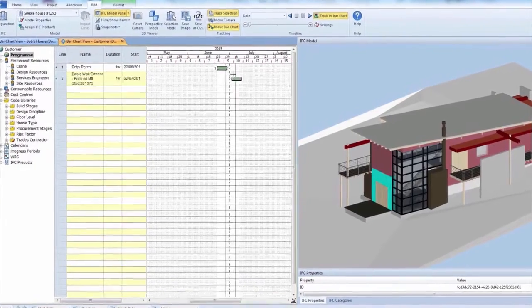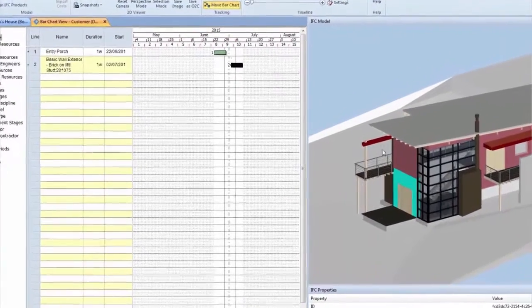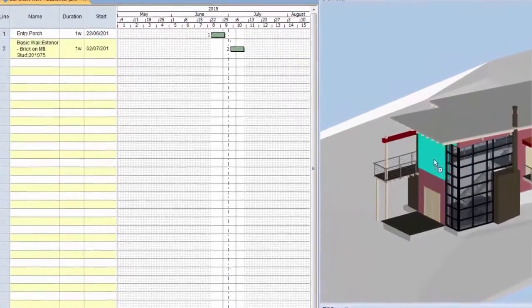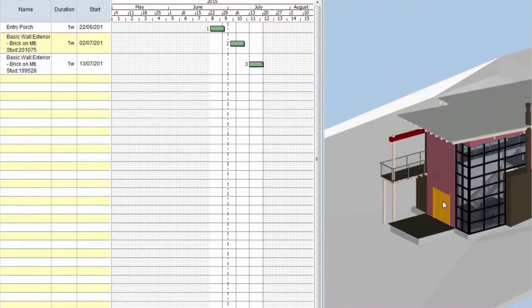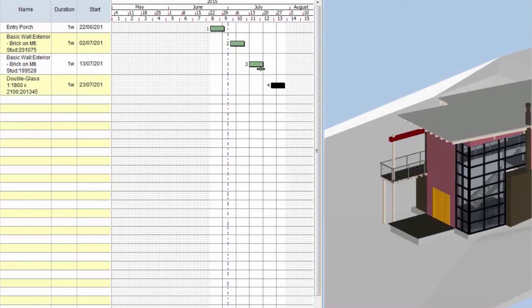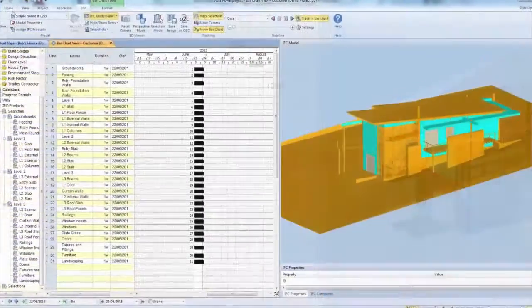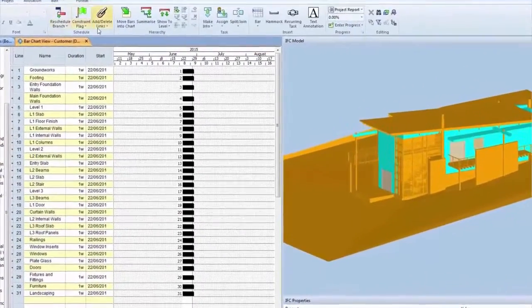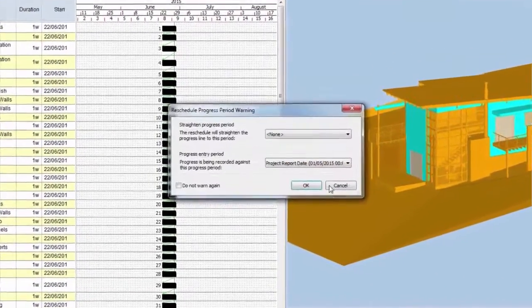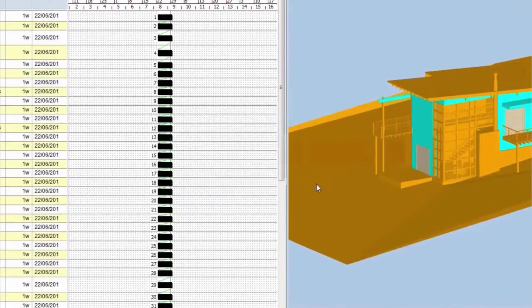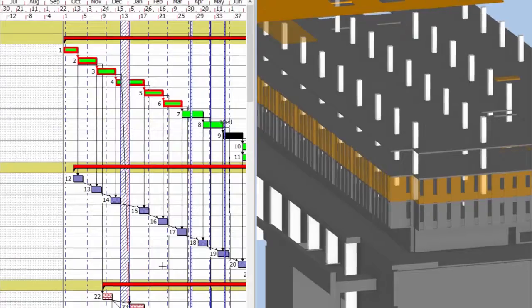You can quickly create schedules directly from a 3D model by dragging and dropping objects between the 3D view and tasks. You can also use structured templates with predefined searches to automatically link to the model objects.